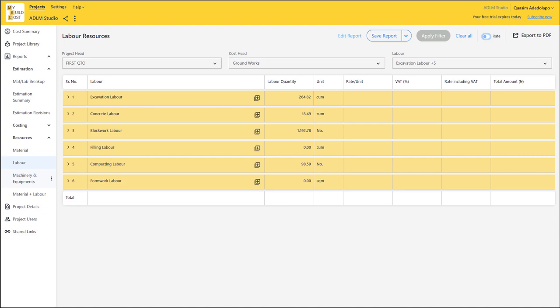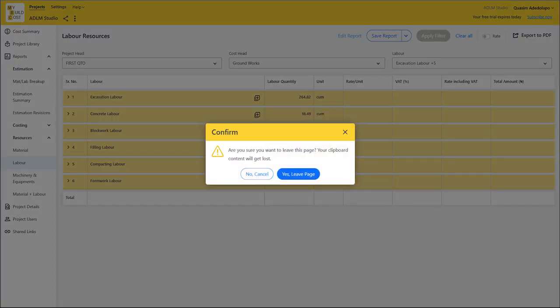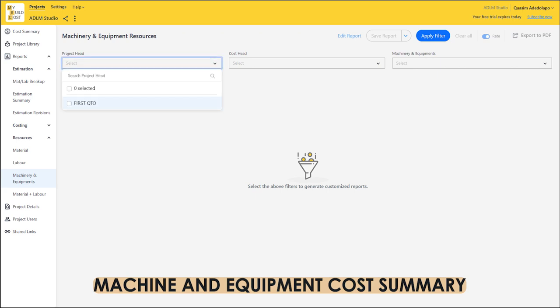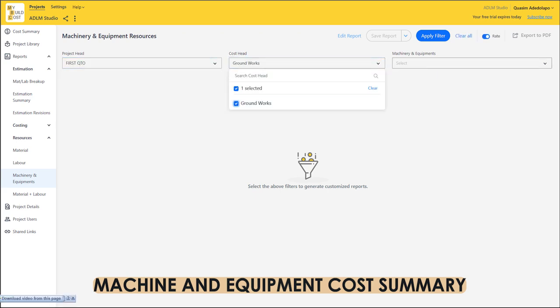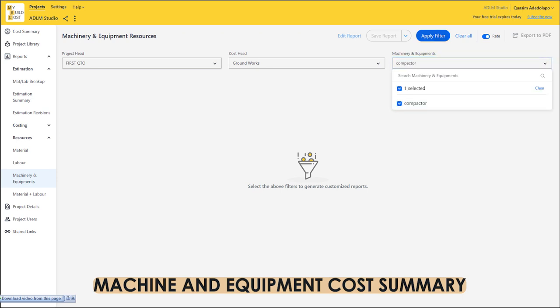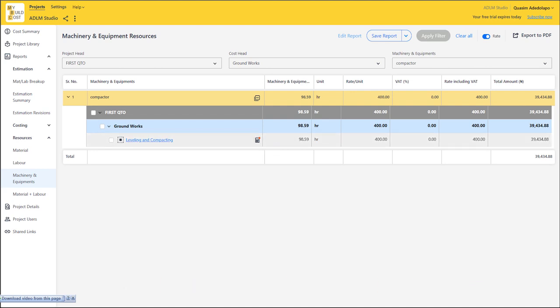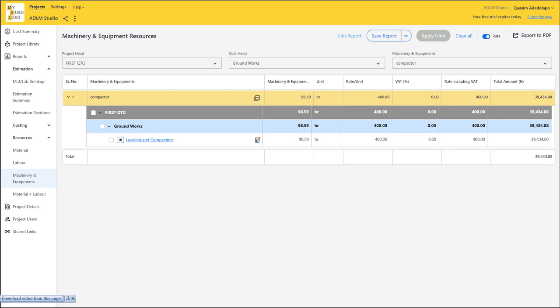You can also check out the machinery and equipment section. It allows you to capture all of the machines associated with your project. We have a compactor for this project. Click apply filter — you see leveling and compacting, and the duration. It's telling you that for leveling and compacting work on this project, we're spending 98.59 hours and paying 400 Naira per hour. So this is your total cost of renting that compactor. All of this was calculated based on your single quantity takeoff — not repetitive takeoff.